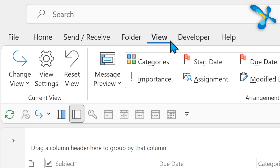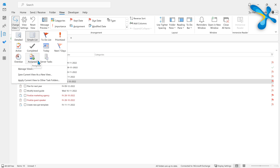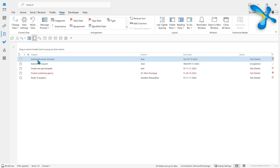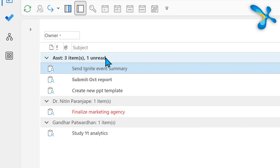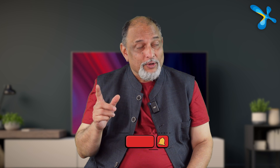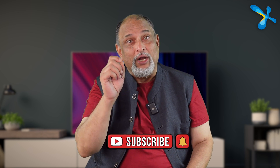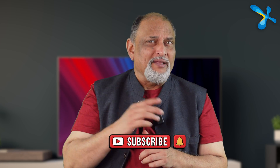When you delegate a lot of work to many people, you want to monitor it. Go to the task folder, go to the View tab, and choose the view called Assigned. That shows you only the assigned tasks, not your own. You can group by person so you can see one person and all the tasks assigned to them together — a brilliant way of monitoring execution.